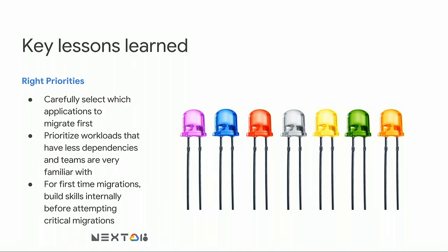So that's one of those things that you probably want to put towards the middle or the bottom of the list, because depending on the mission criticality, if something goes wrong, business may be disrupted. So you may want to start with the ones that are more simple, right? The ones that have fewer interfaces, the ones that may not impact the business in a significant manner.